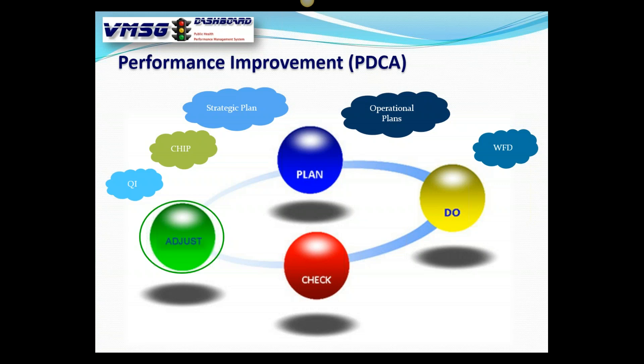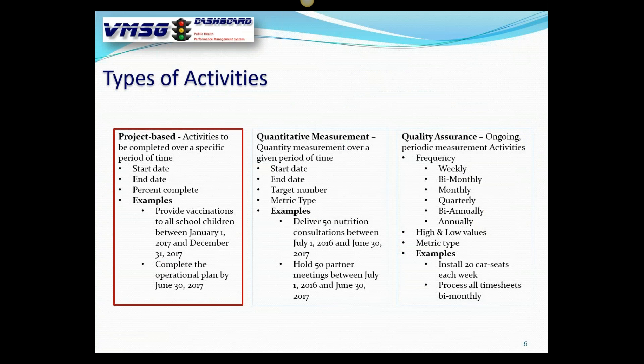Most typically you'll have one of four scenarios: number one is no adjustment necessary; number two is adjust the resources — financial, people, or otherwise; number three is adjust the plan itself; and number four is a compromise — adjust the plan down to, say, 17, adjust resources up by bringing in Bill and outside help. Each and every plan in the system will go through this cycle continuously, based on whatever timeframe you choose — weekly, quarterly, or annually — get to the Check phase, look at the chart, and if everything's good, continue on.